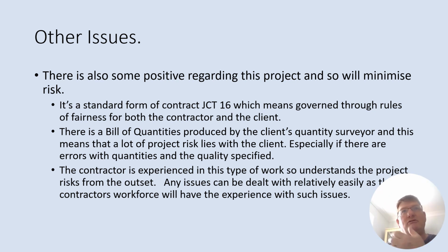The fact that you employ a lot of direct labour is a positive. That minimises your risk with regards to labour costs, which would probably be quite high if you had a lot of subcontractors. Okay. Some of the positives there, though, standard form of contract. So don't forget to write some of the positives as well as the negatives. Okay. These minimise your risks. Okay.